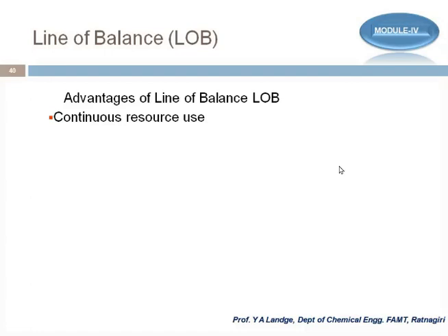One day it is remaining idle. That is a wastage. We are not doing anything, or we are not working from that mixer because we required it on alternate days. Now, is it possible for me to use it in a continuous manner? So this line of balance will give you the solution to it.